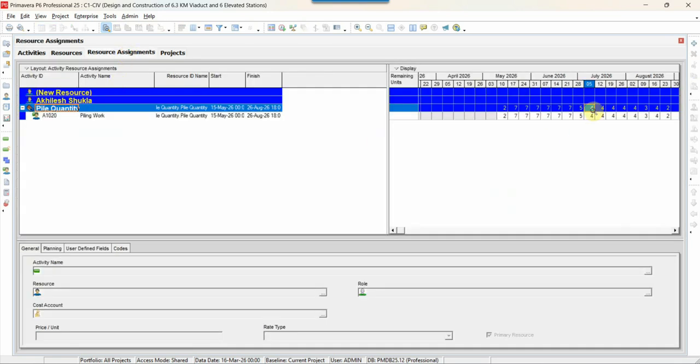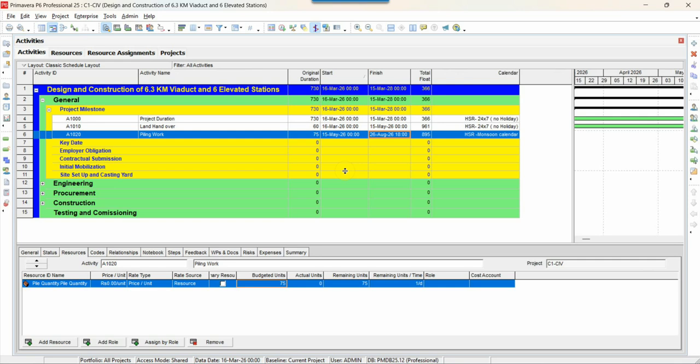If I show in resource assignment, you can see after July the resources and the capacity are reduced to 50% because we have given the loss of productivity calendar in the monsoon. That's why, in this scenario, your calendar comes into the picture. Suppose I only adjust the monsoon activities. My land gets delayed, so I will not get anything from this activity because I have not considered those durations in my activity, because it is completed before the monsoon.